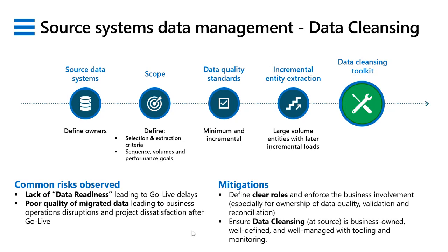Think about that for large volume entities, that you have some means of being able to do incremental load so that the extract of a very large amount of data from the source system does not become a performance hindrance at the final cutover. That you're not sitting there waiting 8 hours while you're extracting 1 million records from a legacy system. Right? Have some definition of what you need to do if the data extraction requirement from the source system is very large. Maybe you do it in pieces or you do it in some other way.